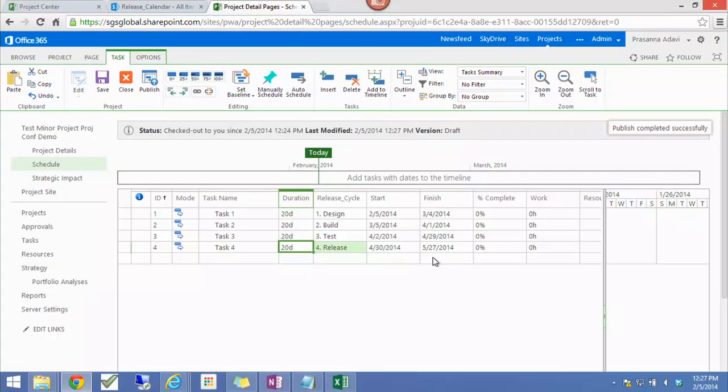Good question. So there can be milestones if you can force them to be milestones, if the people who are building the schedules are good enough to make them milestones. A lot of times what happens is, you say, okay, here is a template, these need to be the milestones, don't touch it, and how many times did they not touch it? I'm not talking about good skilled project managers or schedulers. I'm talking about people who are resource managers, simple team leads who are tasked with this kind of stuff. Now they have to build the schedules. The lookup table takes away our dependency on it being a milestone, accurately scheduled.